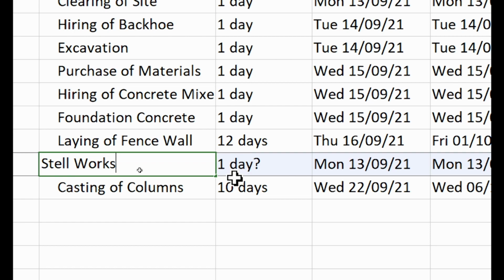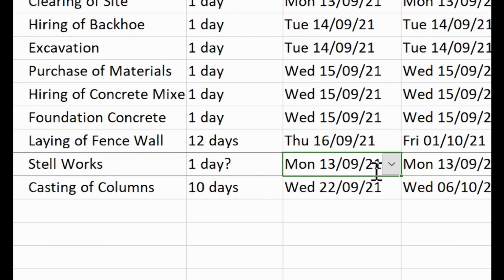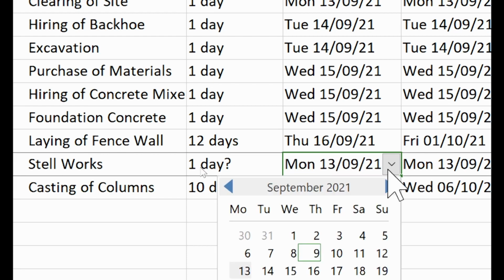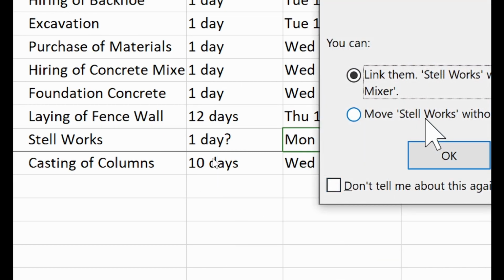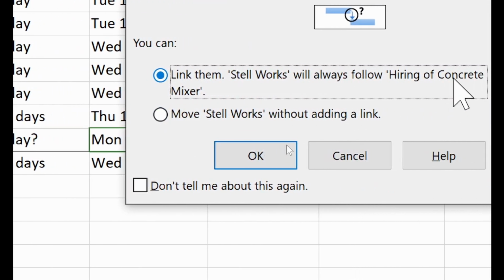The steel bending can commence when the block laying also commences, or even before we start the block laying. So whenever the steel bender will start work, let's choose. The block laying, we did it on the 16th, right? So when do you want the steel bender to start? It can also start the same day. We will be forming the metal work. Okay, so 16th. Let's do it.